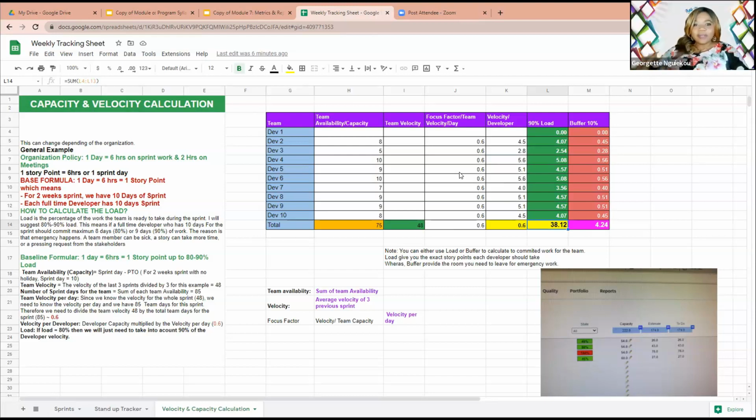I created a template and I let my boss know that, hey, I created a template for my team regarding the team working agreement. Of course, right now everything is going smoothly. But this crisis happened. So now they came out and said, before somebody travels, he has to make sure that this checklist is checked, that he has to do this and that.